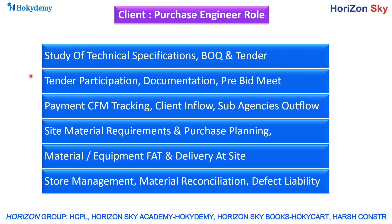The purchase engineer also handles tender participation, documentation, and pre-bid meetings. Before a contractor takes a job, there is a pre-bid meeting where different contractors attend to ask questions about the client's tender. The purchase engineer attends to clarify queries with the engineering consultant or client, participates in filling out tender rates, and handles documentation from project start through the entire handover process.